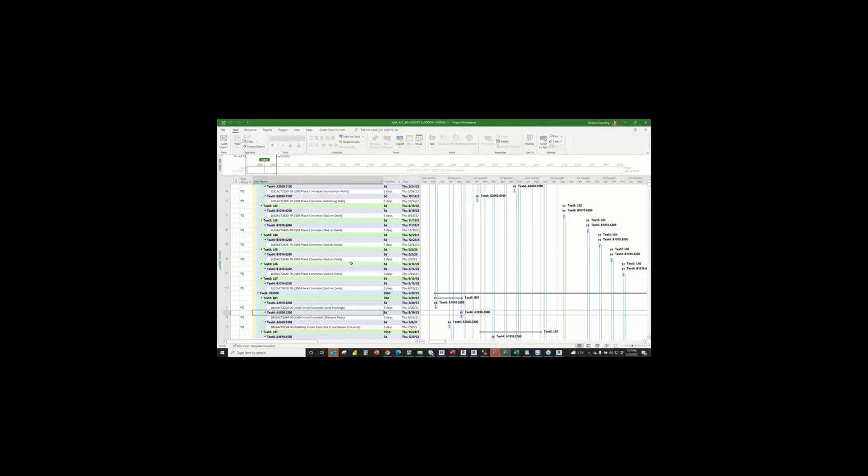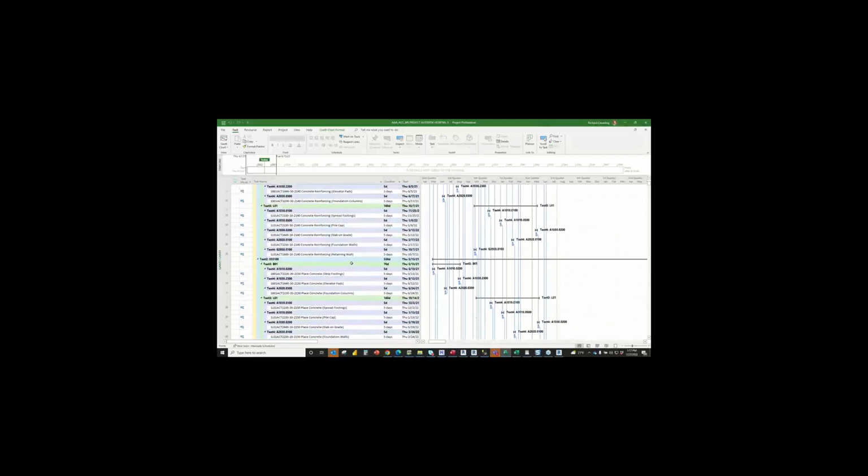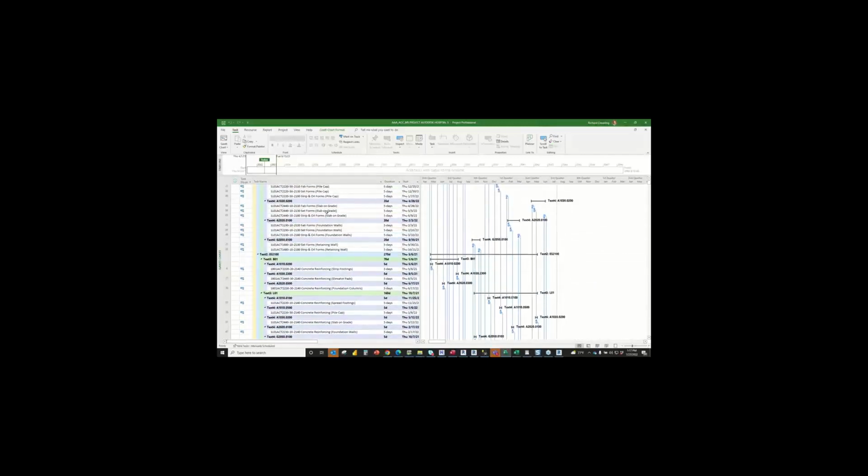To get to that finer level of detail, I can run the same model through some 5D estimating that maintains the instance IDs that I was showing in this file. I never lose those. And that's really what the collection set utilizes to make the joins, is the instance IDs, is ultimately what makes the grab.